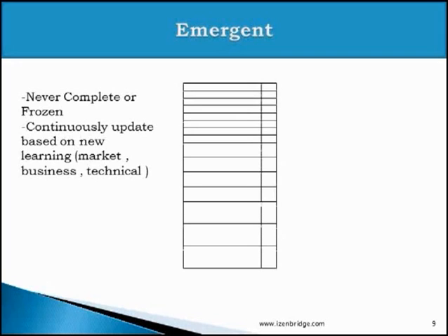If we look at a product backlog, new items may get inserted during the sprint, like the example I gave initially where the coupon got inserted while the team was working on the current sprint. That is how the product backlog keeps emerging. As we spoke, the items which are not at priority may remain at a gross level. They are not sliced enough, they are not sprint ready.